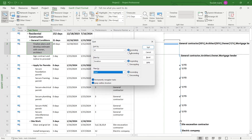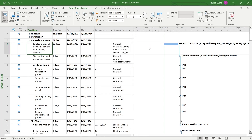After that, you can select whether you want to sort them in ascending or descending order. I'm choosing ascending order. Make sure the box for permanently renumber tasks is checked, then click on Sort. After that, all the tasks will be renumbered according to the values you have given in those fields.